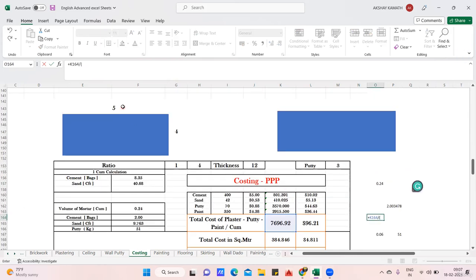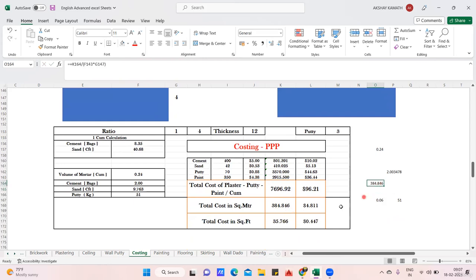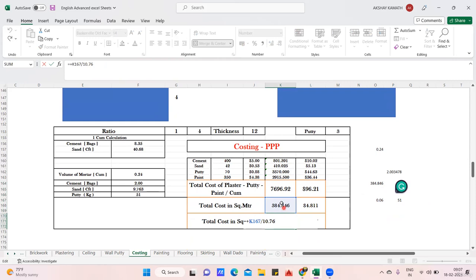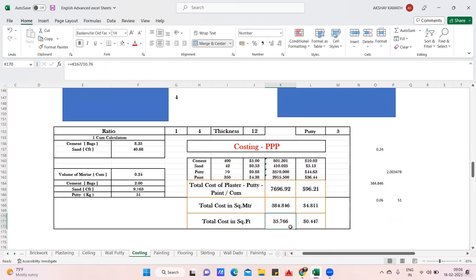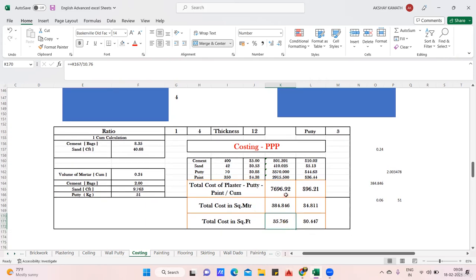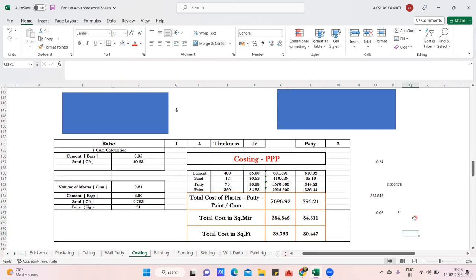To get the rate per square meter, divide the total cost by the area: 7,696.92 ÷ (5×4) = 384.846 rupees per square meter, or 4.81 dollars per square meter. For rate per square feet, divide by 10.76: 384.846 ÷ 10.76 = 35.766 rupees per square feet. In local construction, you would say we charge 35 rupees per square foot for plaster, putty, and paint. Large companies typically work in square meters or cubic meters.